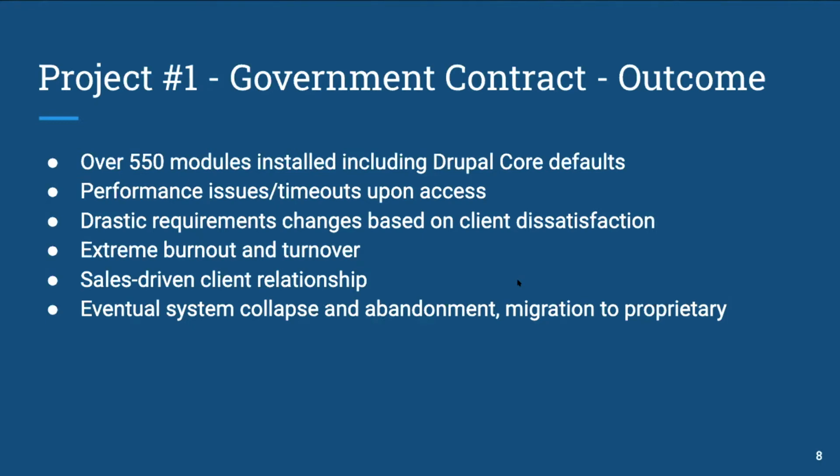So that is the outcome of the first project I was in reference to. Again, looking at the pattern of what went wrong: drastic changes in requirements. We started with a top-down design, meaning that if you have top-level admin access, obviously you can see everything. Then there's a level down from that, which is supervisor, meaning you can see almost everything, and getting smaller and smaller down to the lowest level admin, where there's a very small amount you can see. But then the model got flipped upside down, where they started to say, well, maybe admins should have full access so they can do more administrative things. That completely flipped things upside down, right? Because it's a completely different way of designing your system architecture and the algorithms that drive it, as far as who accesses what and when, from the inside out. So those were some of the big hurdles.